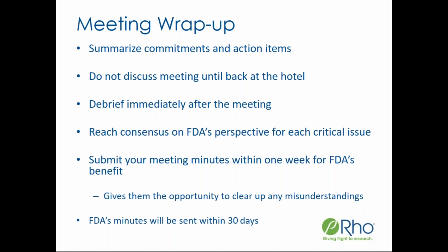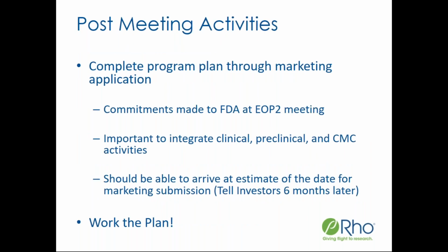write that into organized meeting minutes and get it back to the FDA quickly, because the regulatory project manager or consumer safety officer oftentimes will use your minutes in helping them construct their minutes, and then there's really a consensus between the two organizations. FDA's minutes will not be coming to you until 30 days after the meeting.